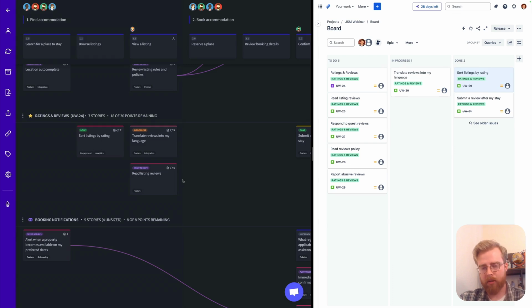So the sense checks that you need to be making are, look at the map. Are we able to understand, appraise, and prioritize stories quickly between different steps in the map? Have we got too many steps? Are they too far apart? Are we able to quickly understand, appraise, and prioritize stories within the same step? Is the map too deep? Are there too many things to even begin to have a discussion around what's most valuable?